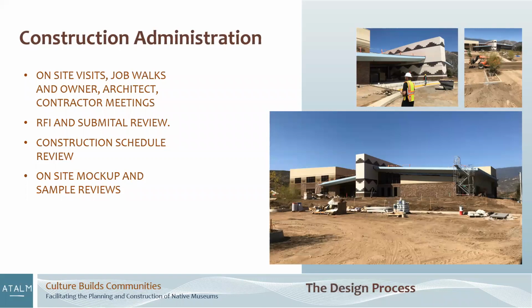We do a lot of concrete work. This particular project had a beautiful cast-in-place board form concrete wall. They did a sample in the parking lot, or in the gravel right there, and it was gorgeous. And I said, if you can do it like this, it will be approved. And it gives them confidence when trying to cast concrete with an integral color finish with board form without any ability to patch it. It gave them confidence that the architects approved this one, I can do it. And they hit it and they knocked it out of the park.